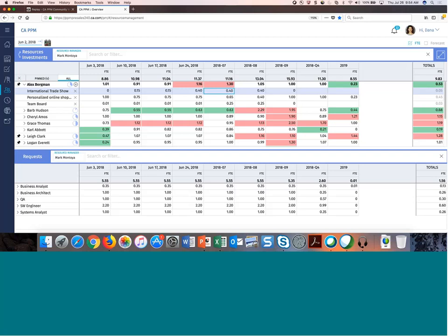Sandy, if a resource is removed from the team, does that clear out the allocations assigned to that resource? So it's kind of a mixed question there. Again, this is future capabilities. Constructing a team, you identify how many people you want on that team. You articulate how much of their time is dedicated to that team. For example, you may have a UX designer, or even better yet, a senior architect that you want to spread across multiple teams, so you would allocate them 25% to 4 teams.